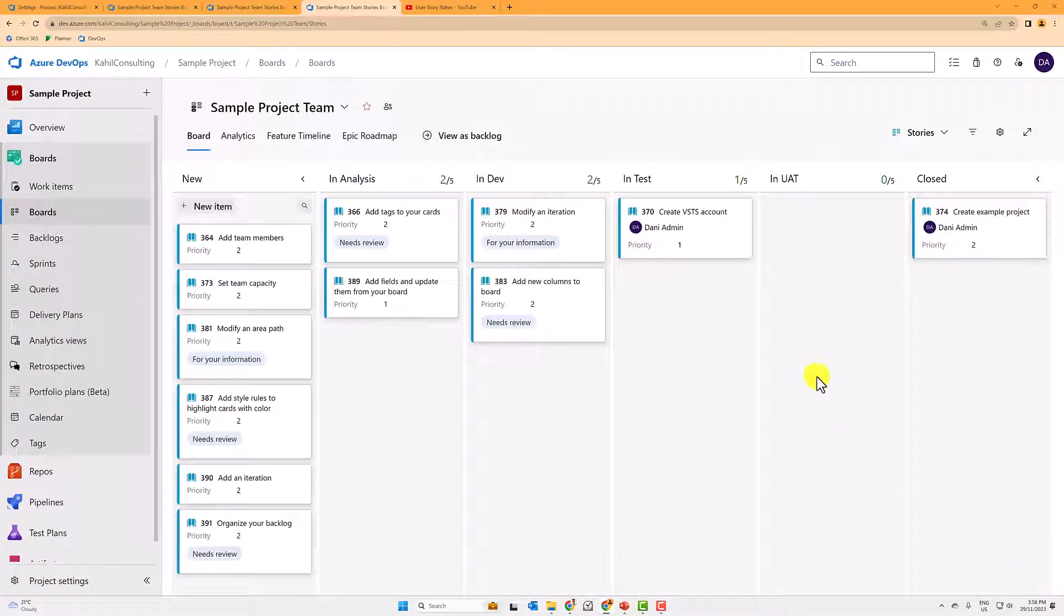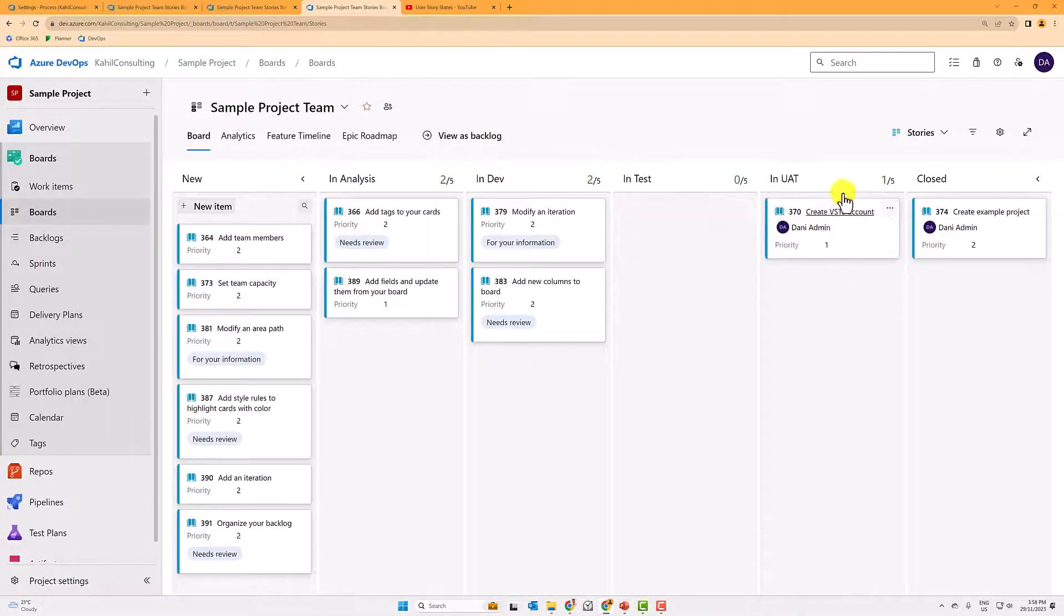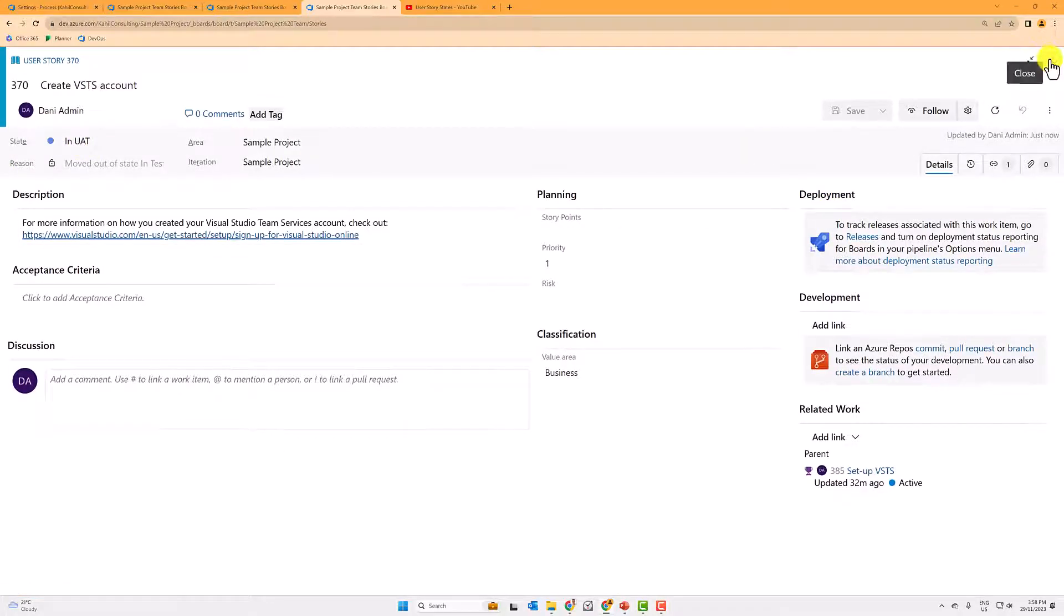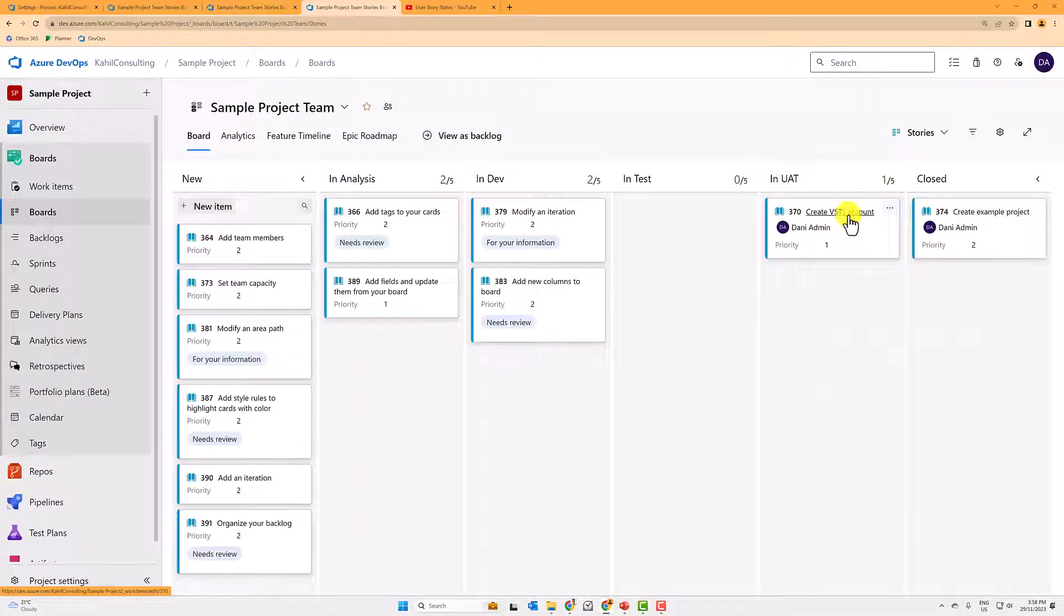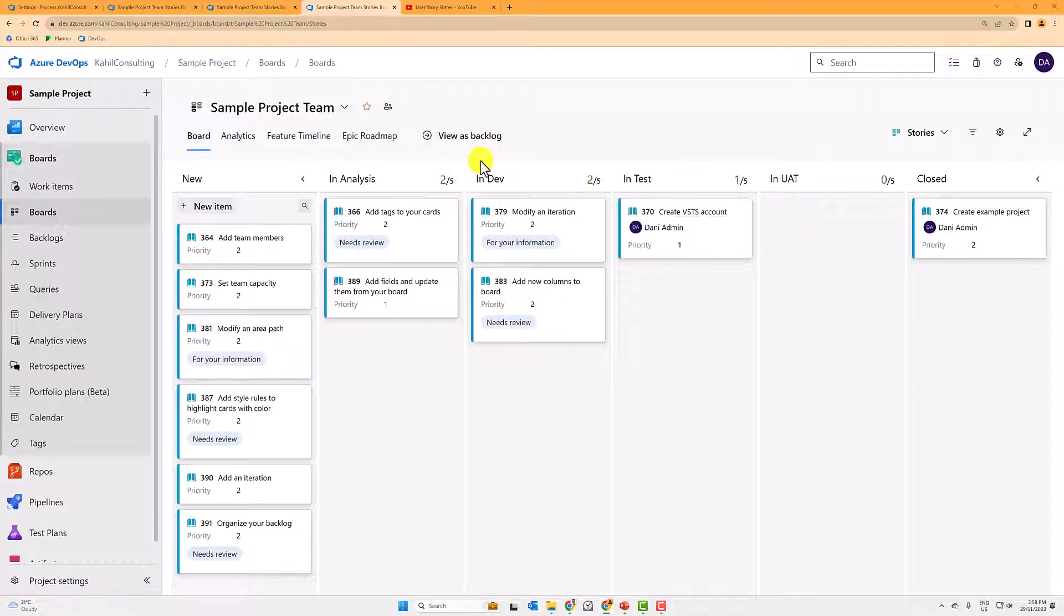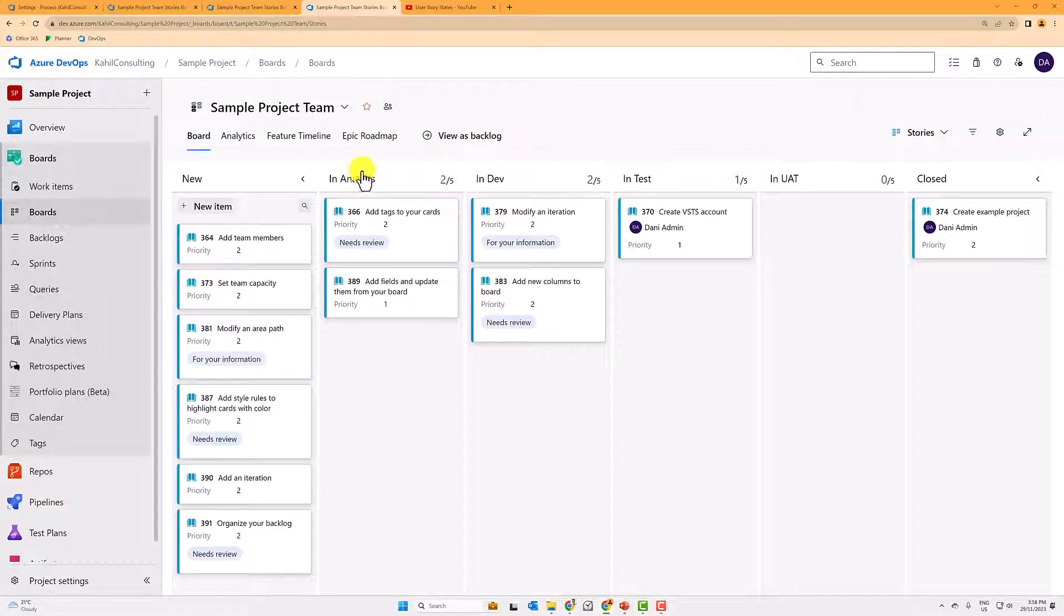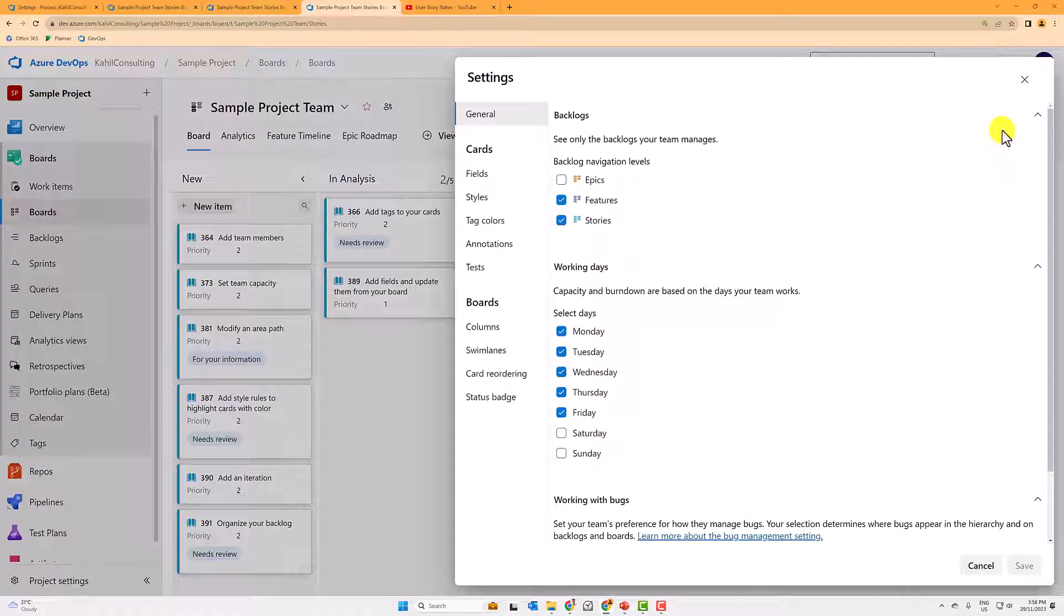And then you can move it effectively to the correct place on the board. So if I do this, now I can move my user story to the in UAT and automatically map it to the in UAT state. So that's one thing. You can also split each of those columns into two sub-columns in doing and done. So let me show you, if you wanted to split in analysis in doing done, in dev in doing done, in test same.